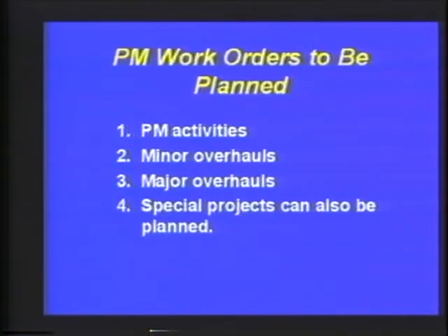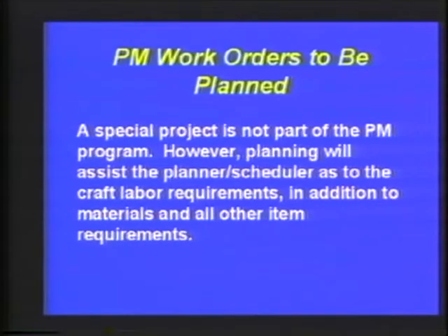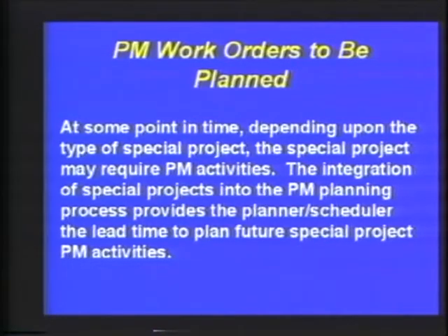Now, projects should actually be planned through the maintenance organization because in many cases, you're going to use craft labor. This also gives the planner scheduler, when he or she is planning projects, the ability to not only identify the labor requirements, but also the inventory requirements of spare parts. At some point, when those planned projects are complete, the project itself, whatever that asset happens to be, may be introduced into the PM program.